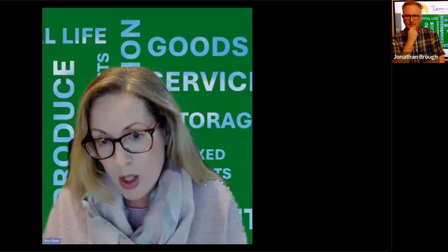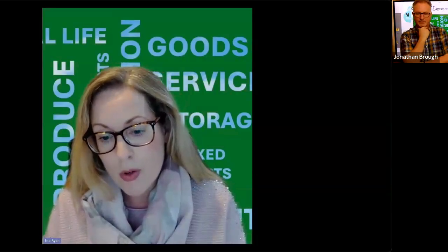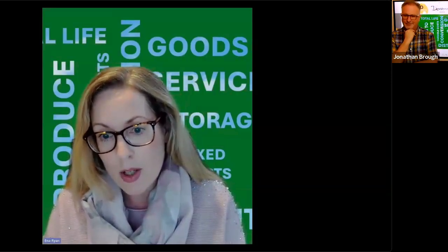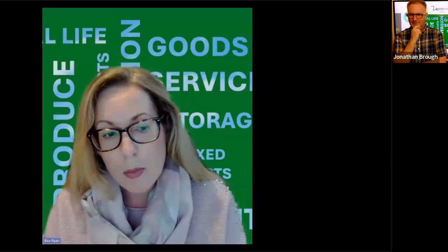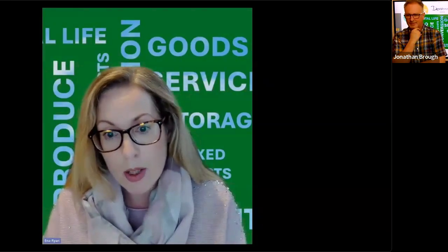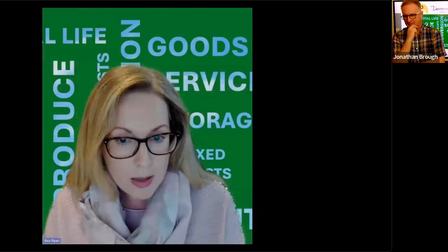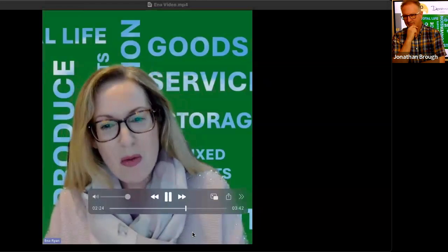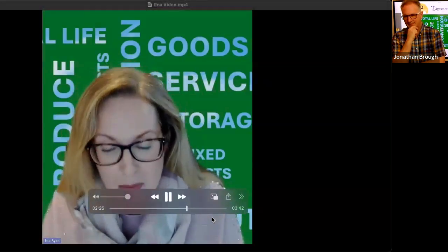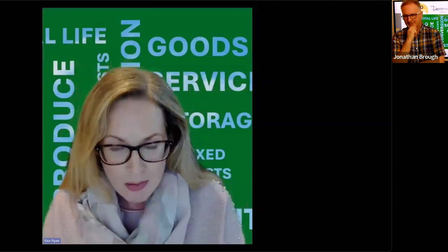So financial information. We will always ask for 3 years of revenue and the last 3 years of the profit. And we want to make sure that any supplier we work with is financially stable and actually will be in business in 2 or 3 years' time. So we want the company to be making a decent margin, not too much, because then we know there's room for negotiation, and not too little, because we don't want them to go bankrupt, but they need to be financially